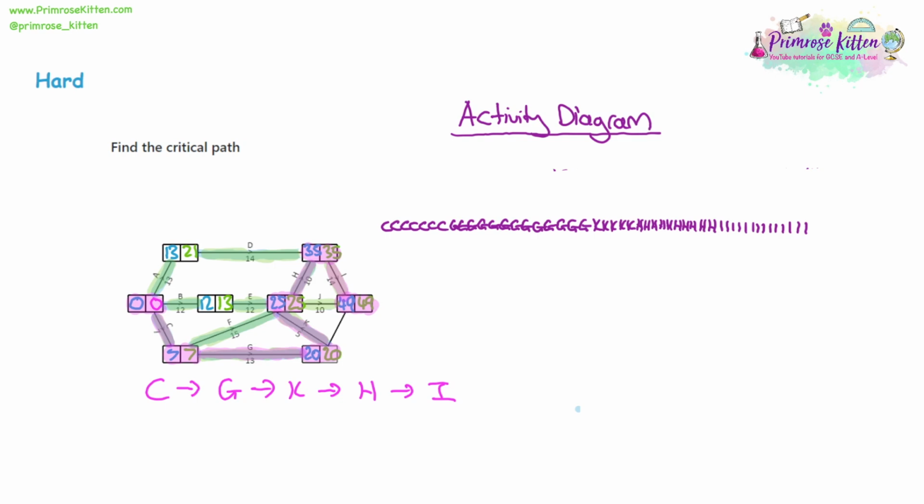It just shows the 49, let's say, hours for this time unit. 49 hours of work that perhaps one employee could be doing all in a row. So you start up with a critical path. Once you've done the critical path, we have to fit in the rest of the tasks. So we've done C and G and K and H and I. So let's look at A.